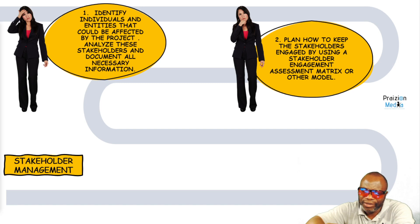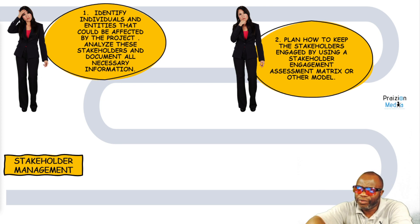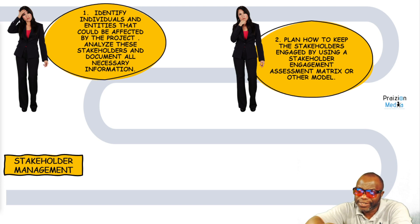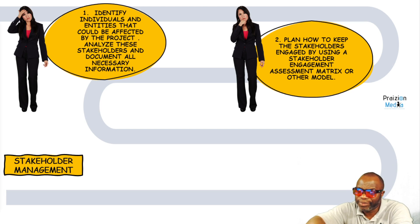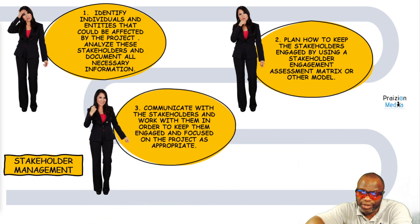The second thing is to plan stakeholder engagement. You have your stakeholder register coming into this process; you'll flesh out the understanding of the stakeholders and then plan how to keep them engaged using a stakeholder engagement assessment matrix or some other model. The outcome is a stakeholder engagement plan.